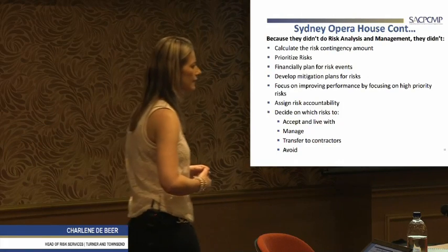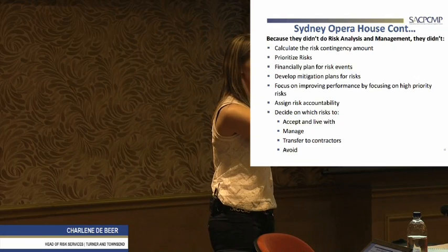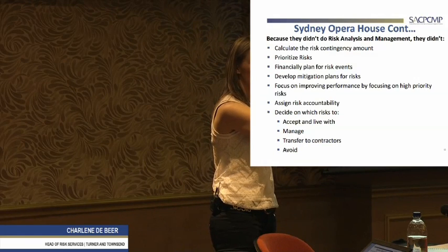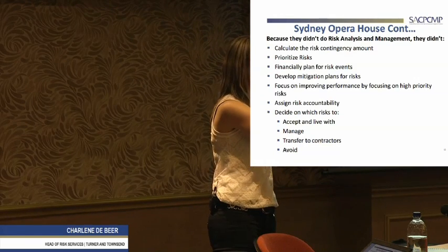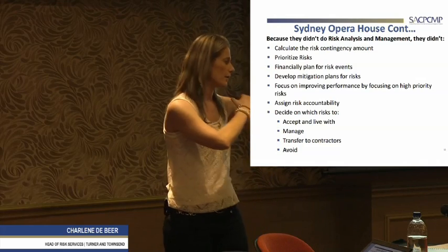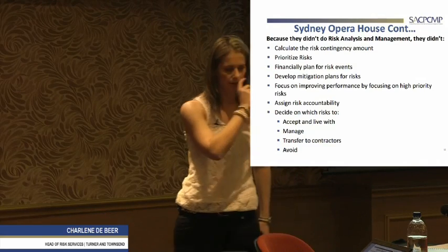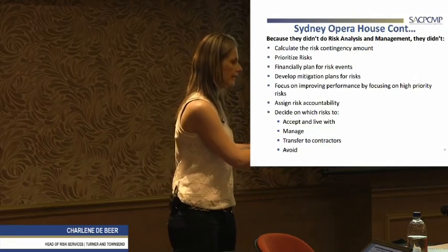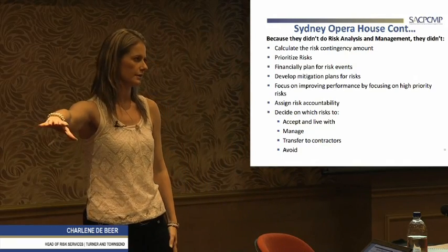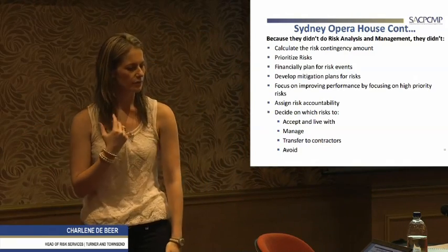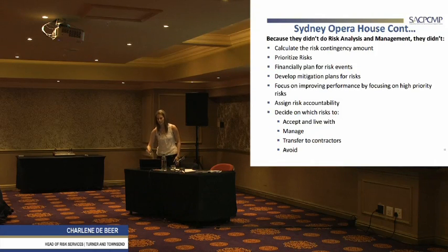So what the client might say is, well, I want to avoid any unrest within the community, any lease agreements, any disruption to my construction or to site. So I'll rather avoid that and rather construct it here. So there are scenarios where we can try and avoid risks. But the important thing is we'll only know how to treat and mitigate it if we know what the risks are. So if we don't do a proper risk assessment, we still don't know what we need to do or put in place.